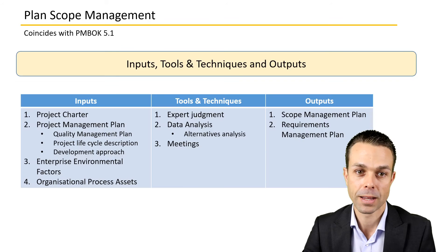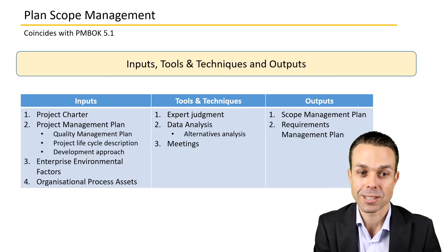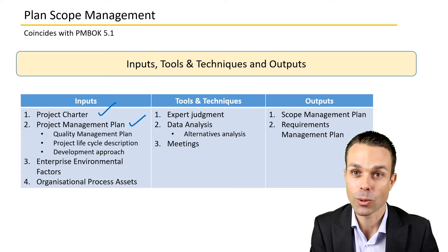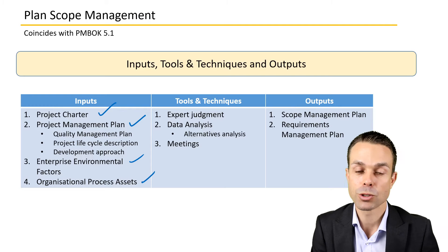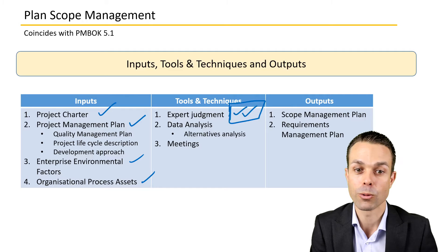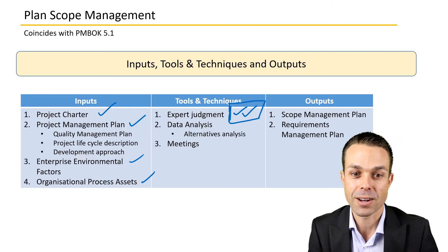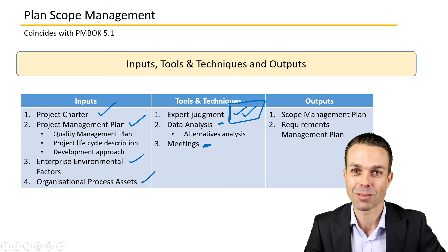For inputs, tools and techniques, and outputs of Planning Scope Management: the project charter and project management plan are inputs, along with EEFs and OPAs. The tools and techniques we'll use include expert judgment from people in various areas — maybe the customer as well — and data analysis where there might be alternatives to choose from.